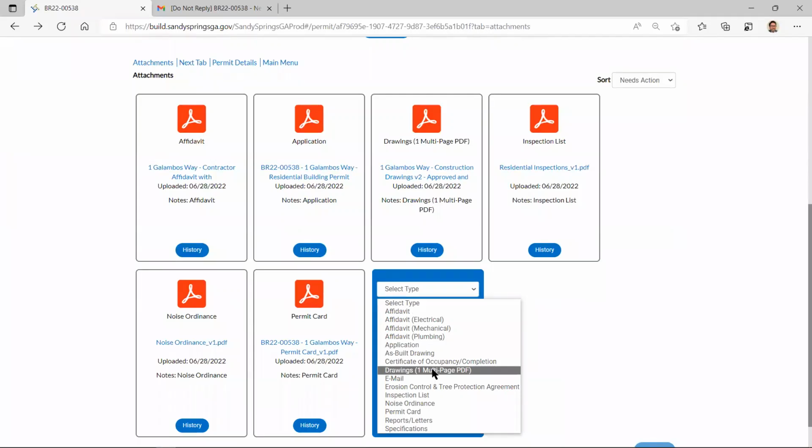This particular one doesn't have it, but we actually call them plan modifications. I did that intentionally because when we first submit drawings and go through a second round, those are called revisions. Revision 1, revision 2, revision 3. I didn't want to confuse that with after the permit's been issued, when we'll have a revision to my drawings. People get confused and send us the wrong drawings. So we call them plan modifications.